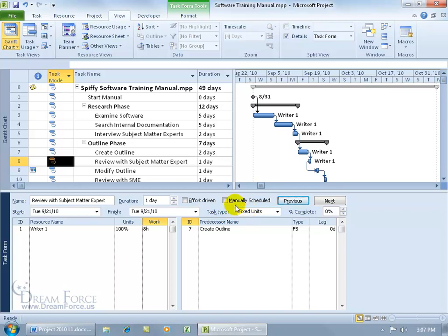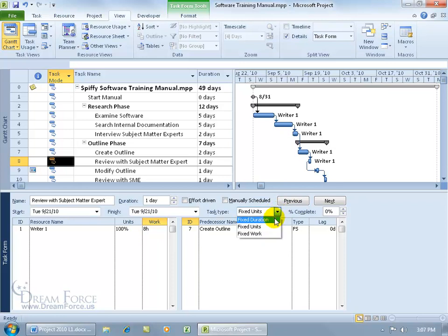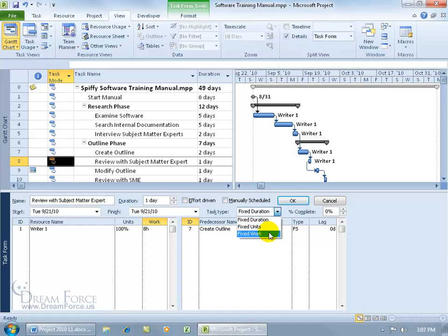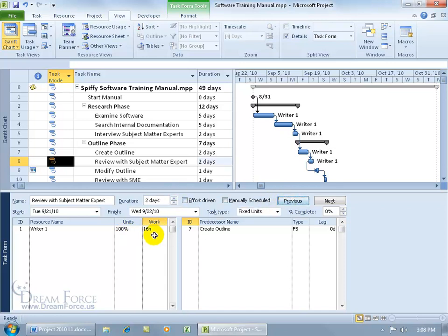What the task type does is determine what happens to two of the three time fields, with the option to keep one of the time fields unchanging — or fixed. By default in auto-scheduled mode, it's set to fixed units. So if you update the duration or the work, it won't change the units. You control that field so no change comes to it. Or you can say: when I update units and work, update the other one, but don't change the duration because it's fixed. And with fixed work, any changes to units or duration will update the other, but not the fixed work field. Going back to fixed units — if I change the duration to two days and click OK, it updates the work.